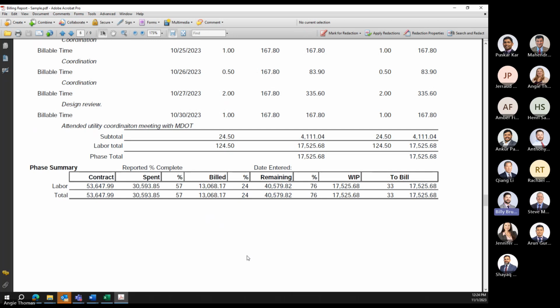So basically, in a nutshell, if you aren't planning to track it by that phase and it means nothing to you as a project manager, don't make it a phase. Just build the hours into how you want to track it. It can be whatever you want, but make it so that you're actually looking at that phase and tracking it accordingly so it means something.